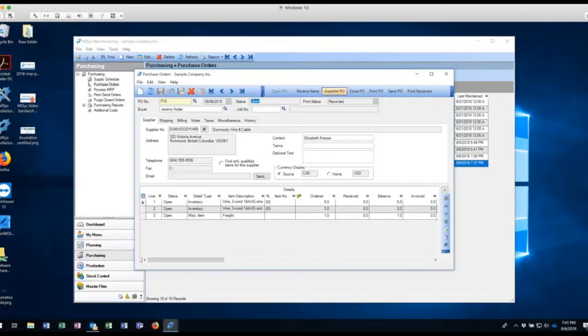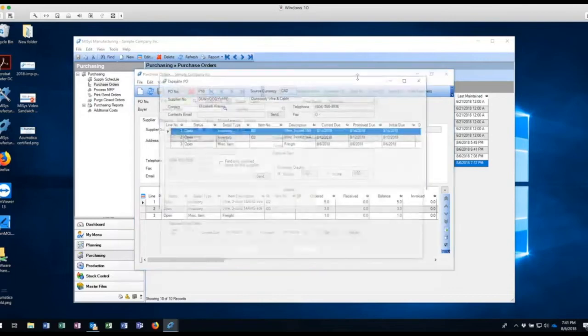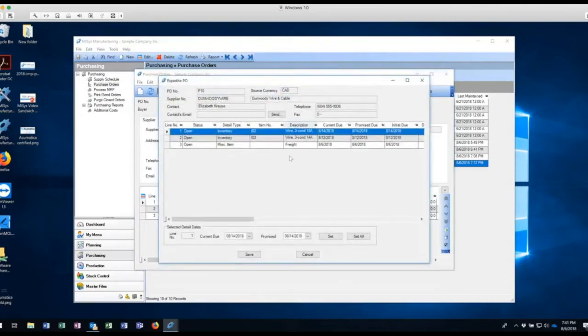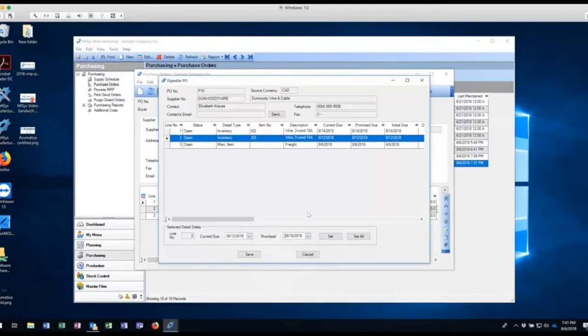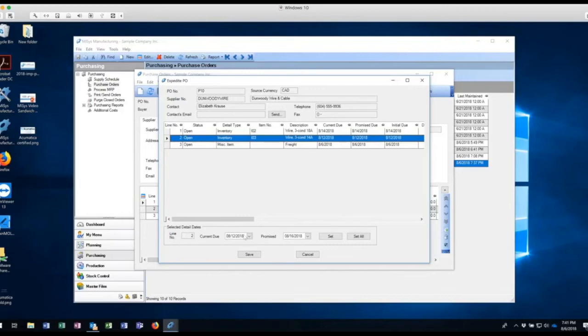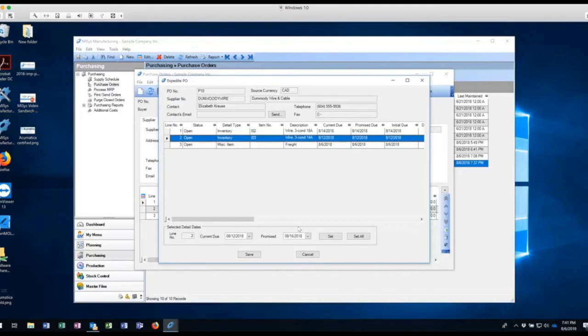So I'm going to go in and click on expedite PO and there it is. And here's my item for the 12th and I'm going to come in here and change the promise date. And there's a reason why I'm going to touch the promise status, along with being able to give that information to my receiving team. I also want to be able to say, okay, this is when I wanted it and this is when I'm getting it. So I have a whole bunch of a matrix that we can do against vendors to see, you know, which one of them are continuously giving us items late and potentially we're going to find a new supplier to give us something on time.